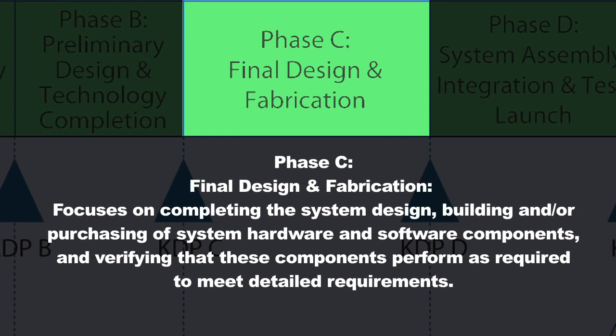During this completion of the design, one of the things that will happen is NASA doesn't usually assign a launch vehicle to a mission in many cases until you get into the implementation phase. I think there's a consideration that not all missions make it through the first phases and get to implementation. So either they end up running over cost or falling behind schedule, or there's some assessment that they can't be technically completed. And so there's a hesitancy to actually assign the contract for the rocket to launch this satellite until you get into implementation. So you're defining a satellite early on through preliminary design, but you don't quite know what rocket you're going to be riding on.